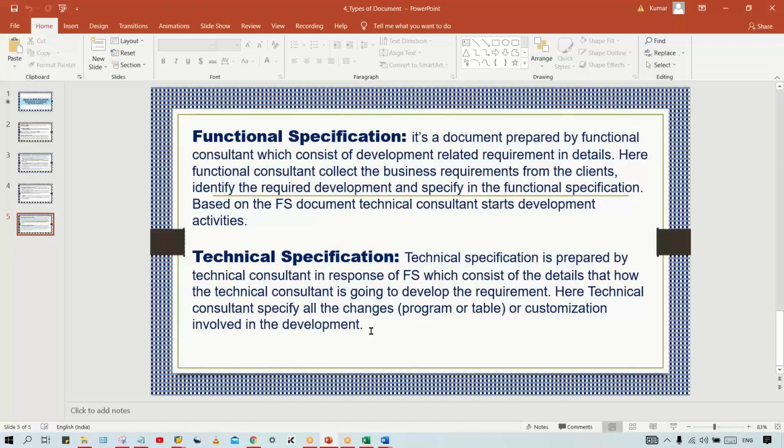then what will happen, guys? They are going to revert to you that whatever requirement was given, we have completed. You kindly test it. You test from your side. If it is working fine, you have to inform your client. They will also test. If it is working fine, then we are going to close the requirement, right?